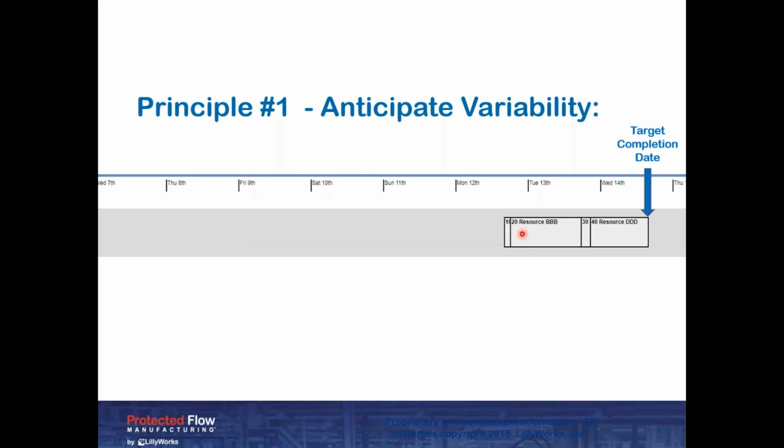And again, the width of these is going to be determined by quantity being produced times whatever setup and run times you've got here. So this is a job that's going to take me 2 days of solid production time, right? So as I described with backward scheduling, if I were to release this job on Monday afternoon, I'd be crazy to expect that all these operations are going to get done in perfect sequence by the due date on Wednesday afternoon, right?